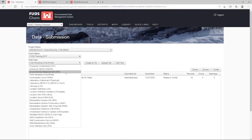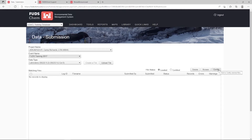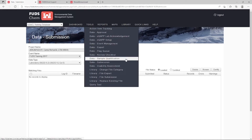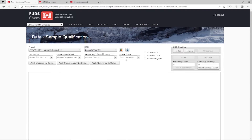It is recommended to start loading lab data as soon as it is available, and complete loading within 21 days after the end of sampling. See our Laboratory SED submission tutorial for more information. As soon as the laboratory certifies their SED file, FUDSCHEM's built-in automated data review processor will automatically begin applying qualifiers. Validators can review, revise, and finalize these qualifiers directly within the FUDSCHEM interface. Validation should be completed within 42 days of the end of sampling. For more information, please refer to our Validation Tutorials.